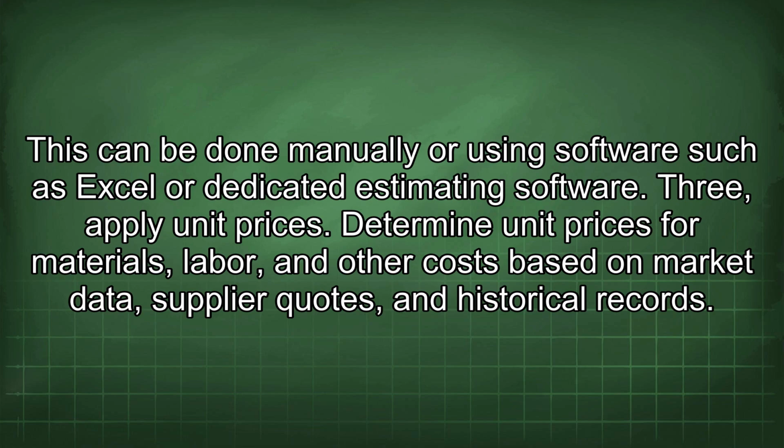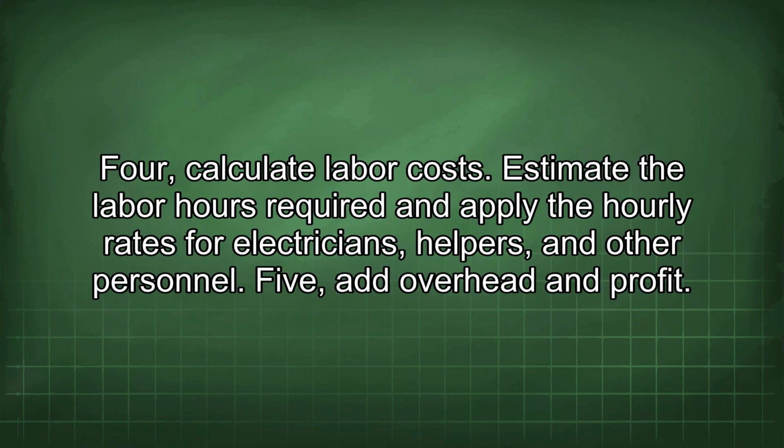3. Apply unit prices. Determine unit prices for materials, labor, and other costs based on market data, supplier quotes, and historical records. 4. Calculate labor costs. Estimate the labor hours required and apply the hourly rates for electricians, helpers, and other personnel.